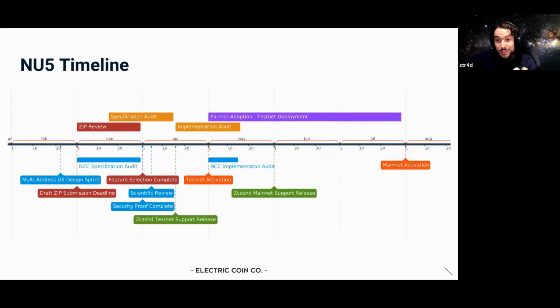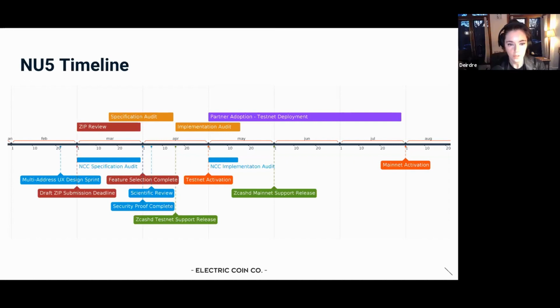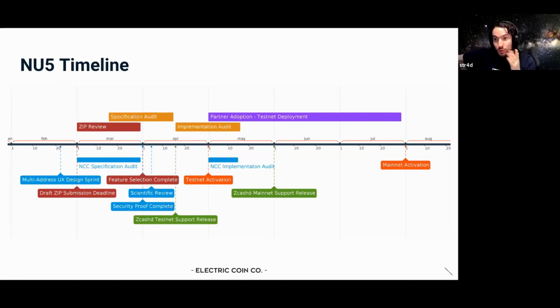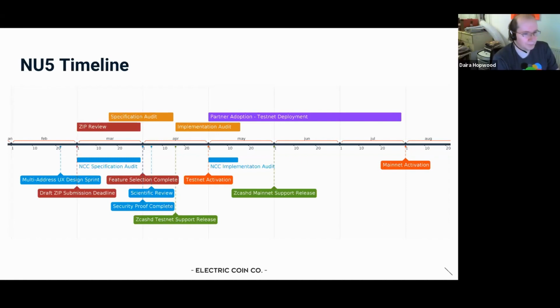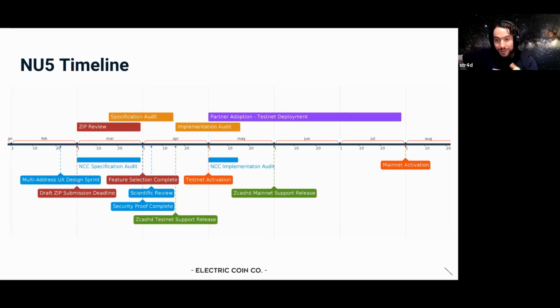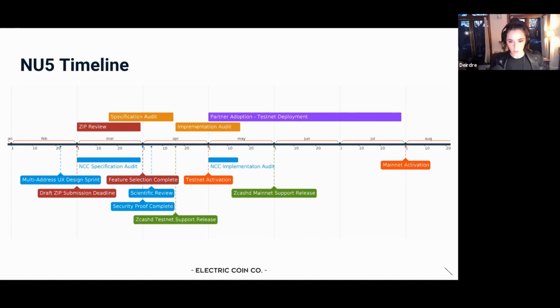We'll have received some of it prior to that point. Right. But I would be doing a poll on this in mid-May, which is 2 weeks prior to the hard point on this current schedule. Because if we don't slip, the hard point is June 1st. Yeah. If we slip 2 weeks, that moves the hard point to mid-June, which we can't move further than. But assuming we don't slip, if everything goes well, we still need the hard point to exist, and that would be June 1st. Gotcha.